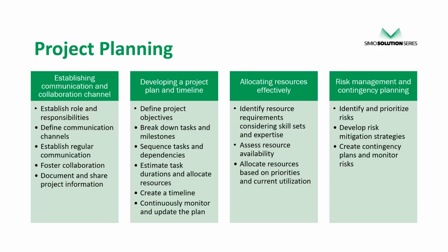And you're constantly monitoring the plan. So if something with your resources changes, which they inherently do, it's going to happen, especially if you're on a long project plan, then you just have to build a replan, right? Build a new plan around the resources at that time, whenever that event may take place. And that really comes into the risk management piece here too, right? So if resources is one of the risks that you foresee, then maybe even having a backup for a person on a project is a really good contingency plan to put in place.